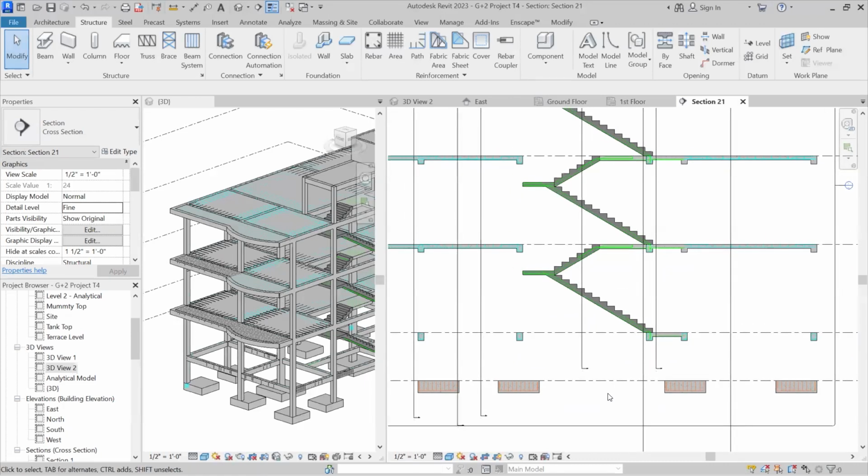Let me share a professional tip here that you have to pass your architectural plan, the section plans, the entire set through the Nagar Nigam. Okay, without passing your building plans through Nagar Nigam, you won't be able to construct buildings in recent times. Okay, in recent times the strictness has increased.